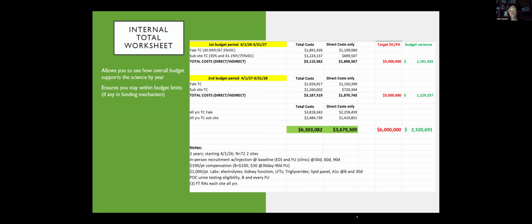This doesn't usually work out this way, that you have so much money left over. So this is not usually the case. Usually I have it the reverse, right? That I have not enough money, and this is all I have. So now I have to go back and work it out and say, okay, I've got to take less. What can I take less for? What do I think I might be able to carry over when I need it later? And go back and keep reworking it until the numbers come out.